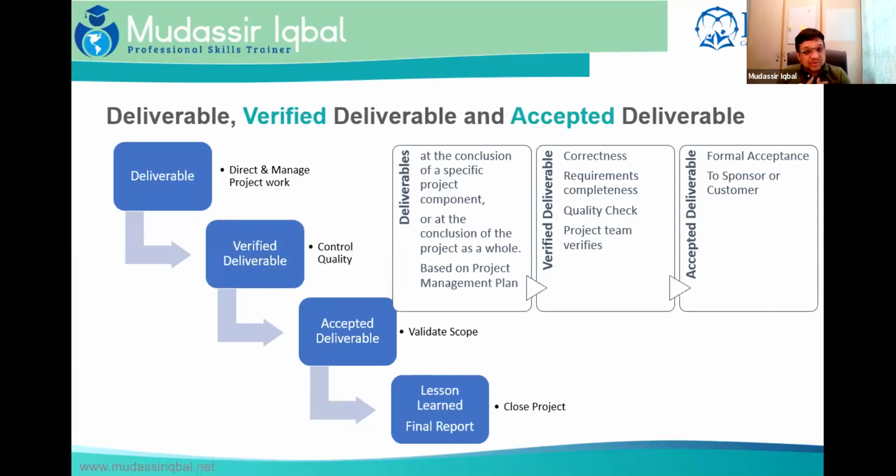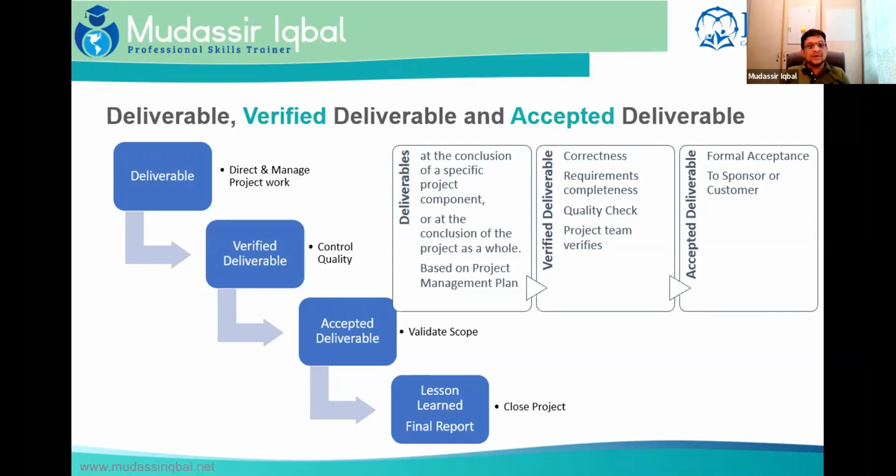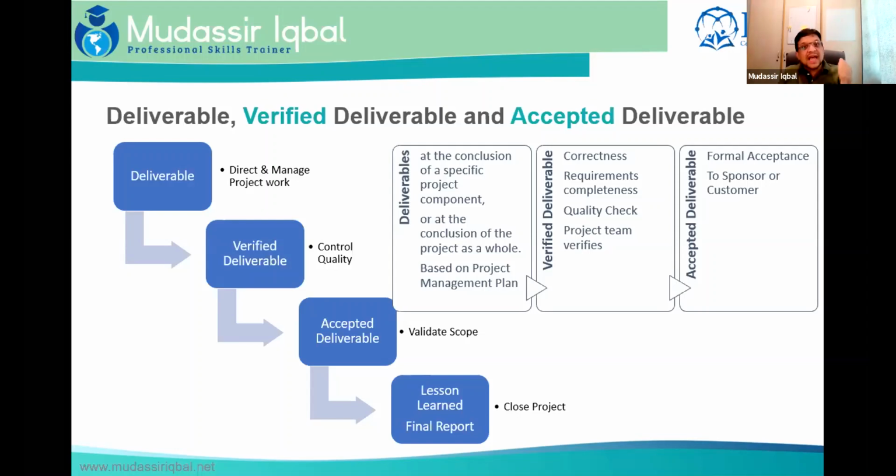So a deliverable is, as Mudassir said, Mr. Iqbal, I have done my job. Now I have a question to Mr. Iqbal. Would you take that statement that I have done my job and this is the deliverable that I have created, please approve it? Will you take this deliverable to the client? No, there has to be a quality check and see whether it has complied to the scope exactly. What are the specifications? So I need to go through each and every aspect of it, then accept it. Yeah. So based on my statement, you will not just say it is done. It has to be QC passed.